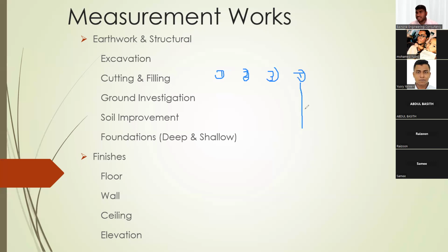Under this stage, they are preparing the BOQ. There is a drawing, there is a specification, there is a vendor list. No, this BOQ is prepared by a senior commercial person, because the descriptions and the coverage of the items all have to be referred to in conjunction with the method of measurement.